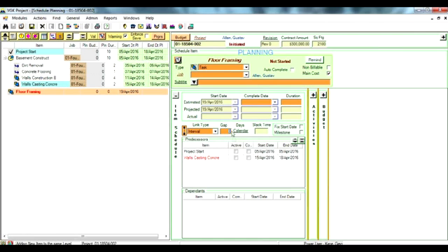We want to change the link to include an interval, which we'll set as 2 days to allow it to solidify. And again, the start date was recalculated from our input, so we'll just add a duration. We might also add a link type to the job, and the item is now added to the schedule.